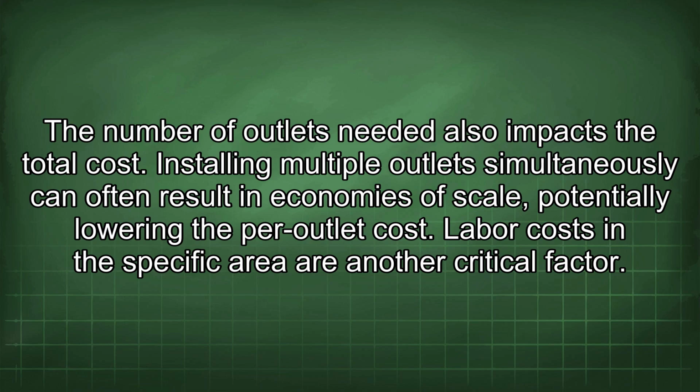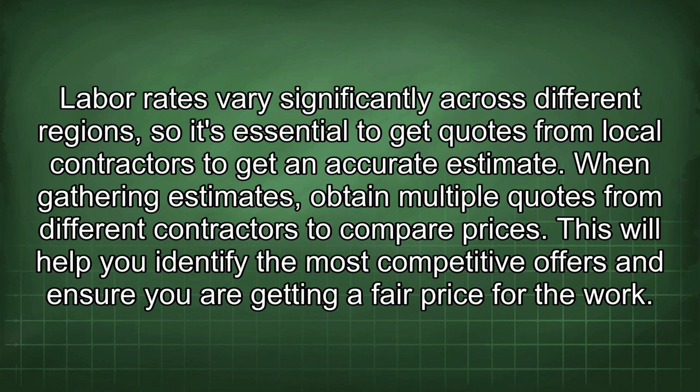Installing multiple outlets simultaneously can often result in economies of scale, potentially lowering the per outlet cost. Labor costs in this specific area are another critical factor. Labor rates vary significantly across different regions, so it's essential to get quotes from local contractors to get an accurate estimate. When gathering estimates, obtain multiple quotes from different contractors to compare prices.